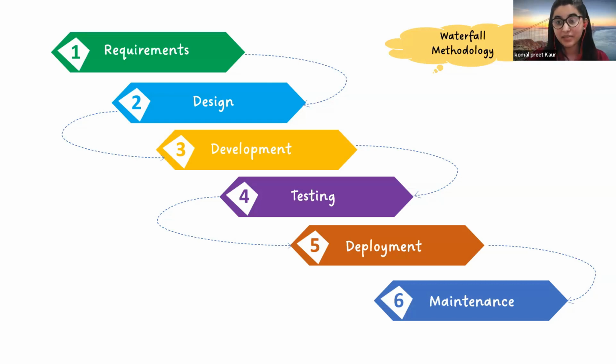In some cases it can be, but for example, like the 6 month example I gave you, you have fixed all your requirements in the first phase only. You have to build 20 features, and those 20 features will be fixed. But what if after 6 months your app goes live and you see that there are other things booming in the market that you should add? In this case you cannot add that. So I can say it is not accurate and prescribed. I hope I answered your question.